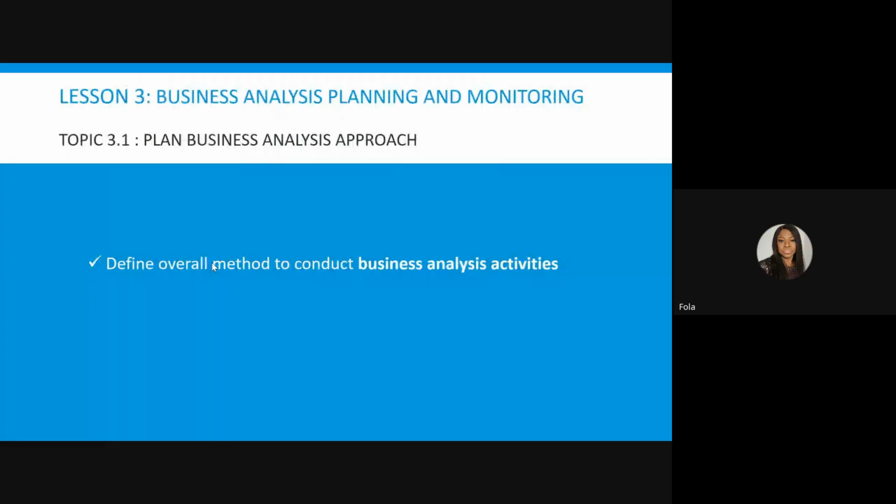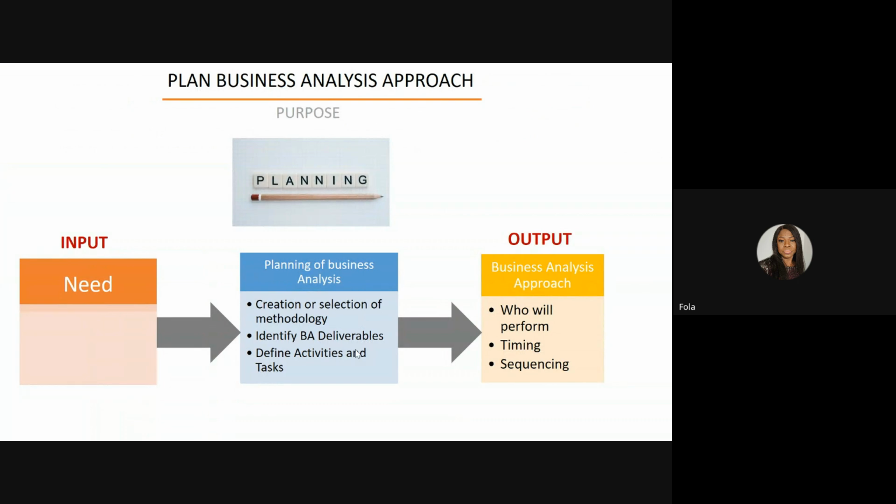So can you give me an example of the deliverables? What do you mean by BA deliverables? See, once you have elicited all the requirements, they have to be signed off. Without the customer signing off on what you have understood, you cannot proceed further. To do that, you need to have a structured document. Say you have gone for the accounting module only. Once you have done the requirements for the accounting module, you need to give that document to the customer to go through whether your understanding is correct or not.